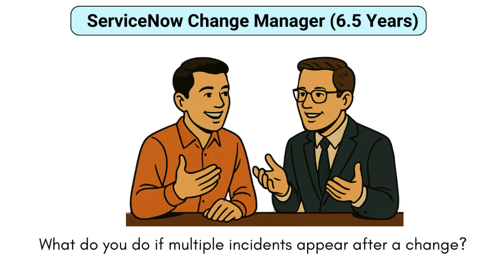What do you do if multiple incidents appear after a change? Okay, so this is a real-time situation. It usually means the change has caused some issues. In this case, I immediately coordinate with the technical teams to either fix the issue or do a rollback. I also notify all the impacted users and update the change ticket. We then hold a post-implementation review to find out what happened — whether the change failed because of testing, a missing dependency, or a deployment issue. All these things will be thoroughly checked and then we come to a conclusion and prepare actions so that this will not happen again in future.